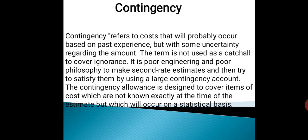Contingency refers to costs that will probably occur based on past experience but with some uncertainty regarding the amount. The term is not used as a catch-all to cover ignorance. It is poor engineering and philosophy to make second-rate estimates and then try to satisfy them by using large contingency amounts. The contingency allowance is designed to cover items of cost which are not known exactly at the time of estimate but will occur on a statistical basis.